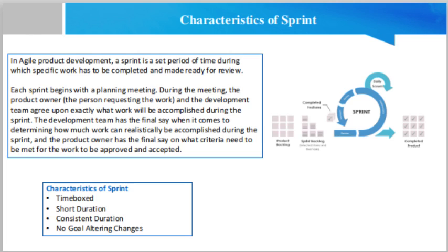Capping of errors. Imagine that you are developing an e-commerce website and after 6 months of work, the product rejection happens in user acceptance testing. So how long will that take to course correct? It will put a lot of stress and pressure on the team to make it work. Now compare this with a sprint. Even if everything goes wrong, it's worth only 1 to 4 weeks of effort. It is still easier to correct and get the project back on track.